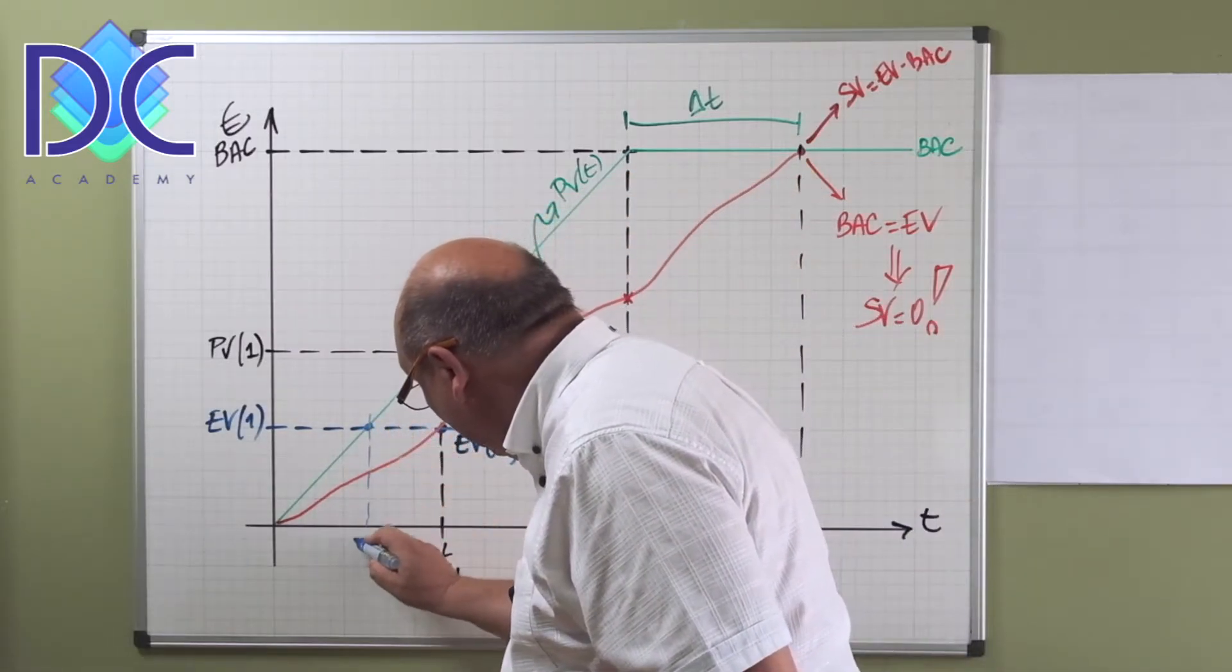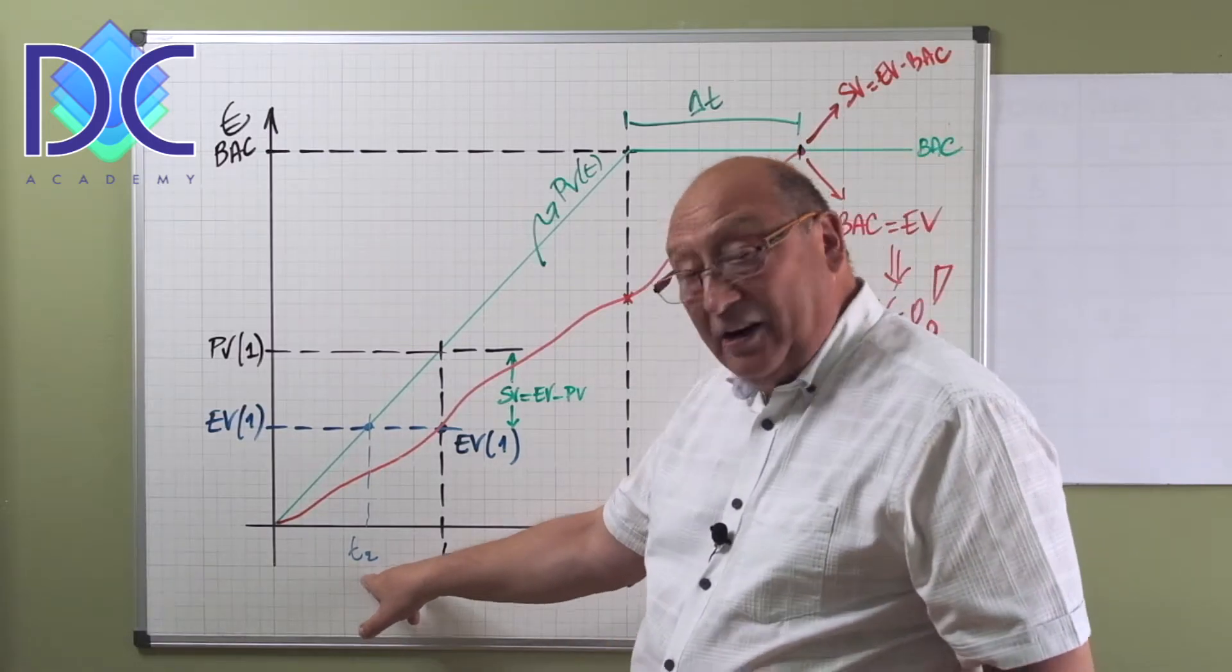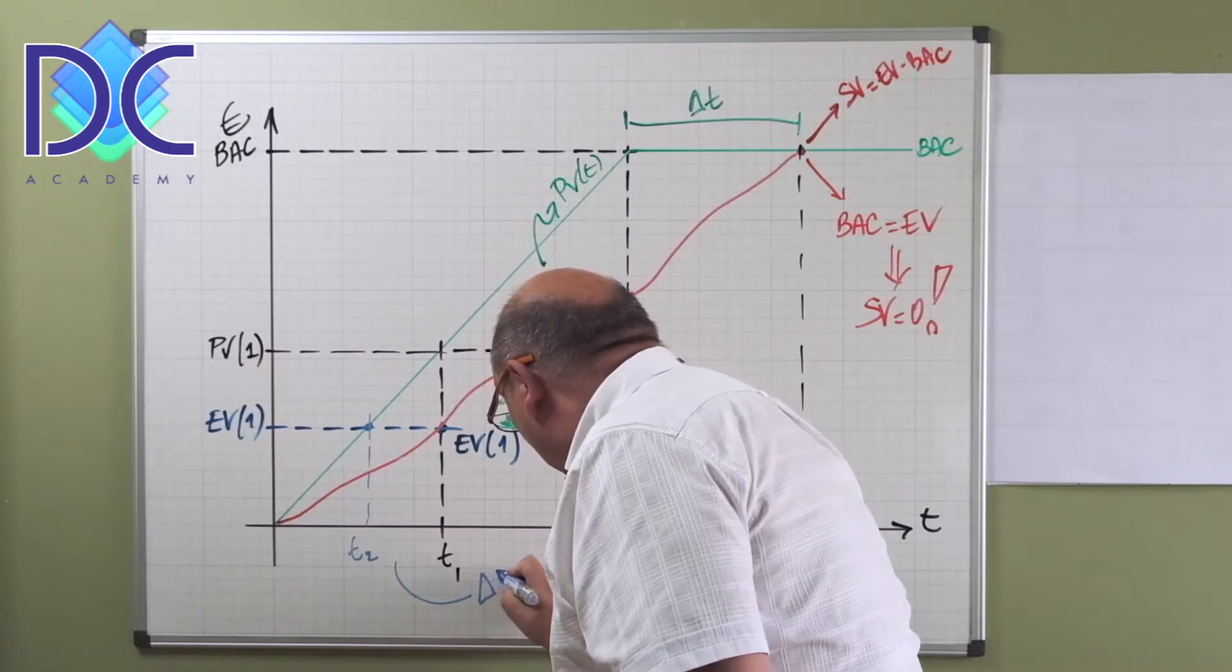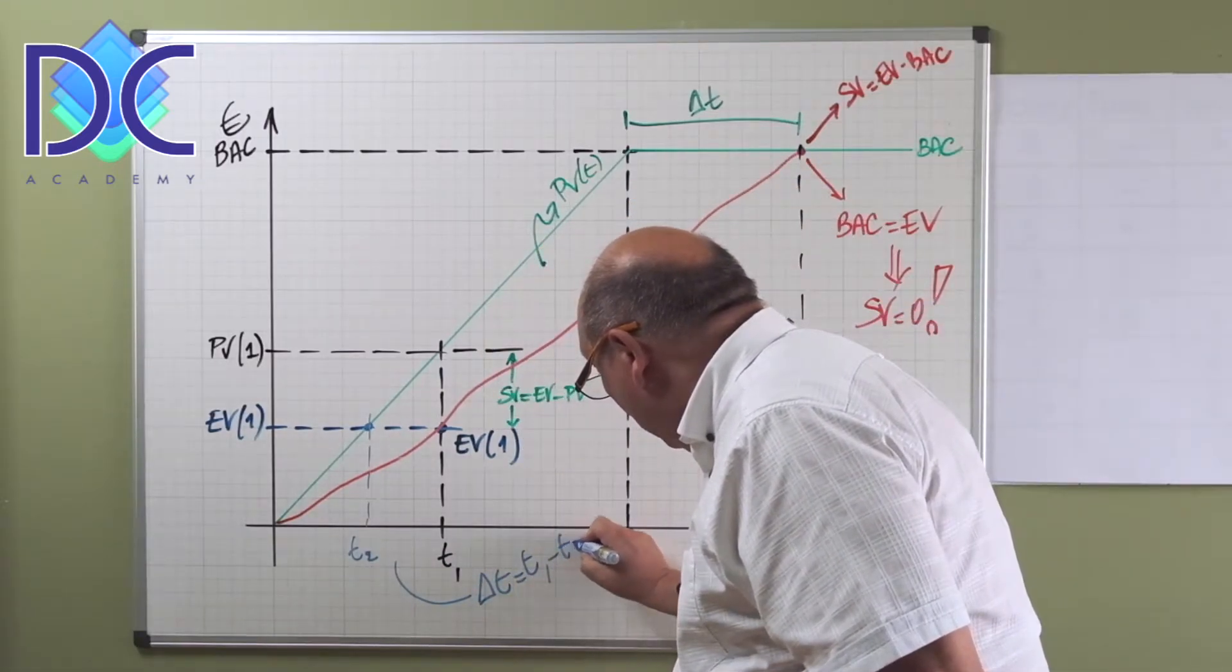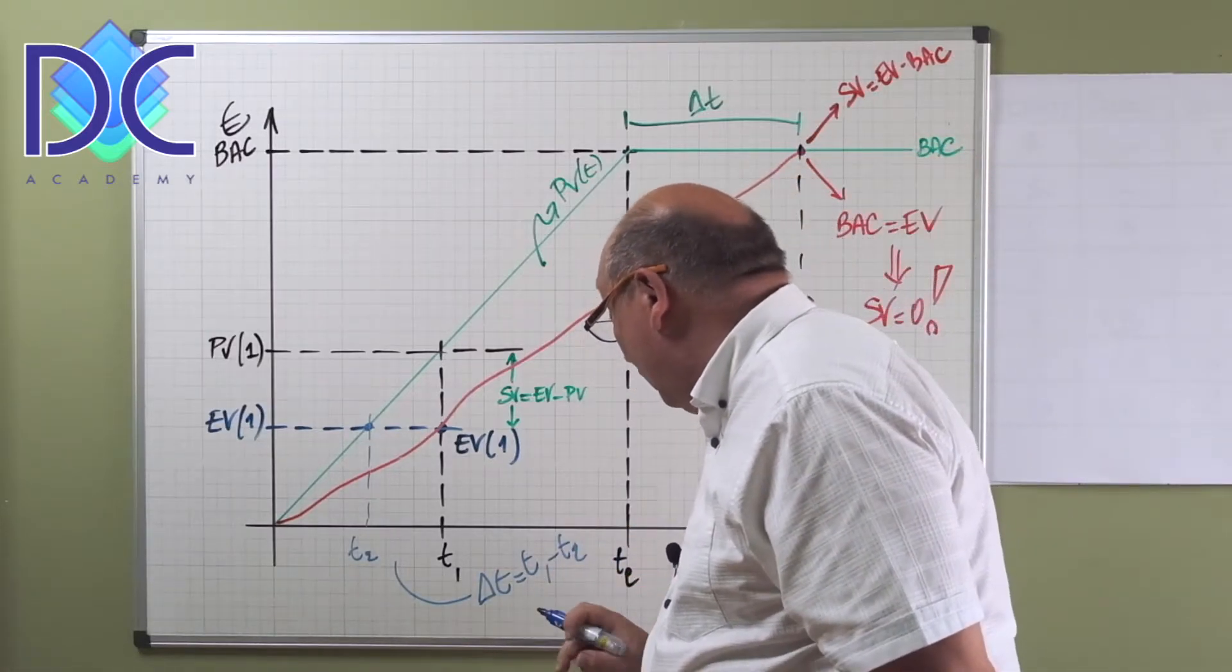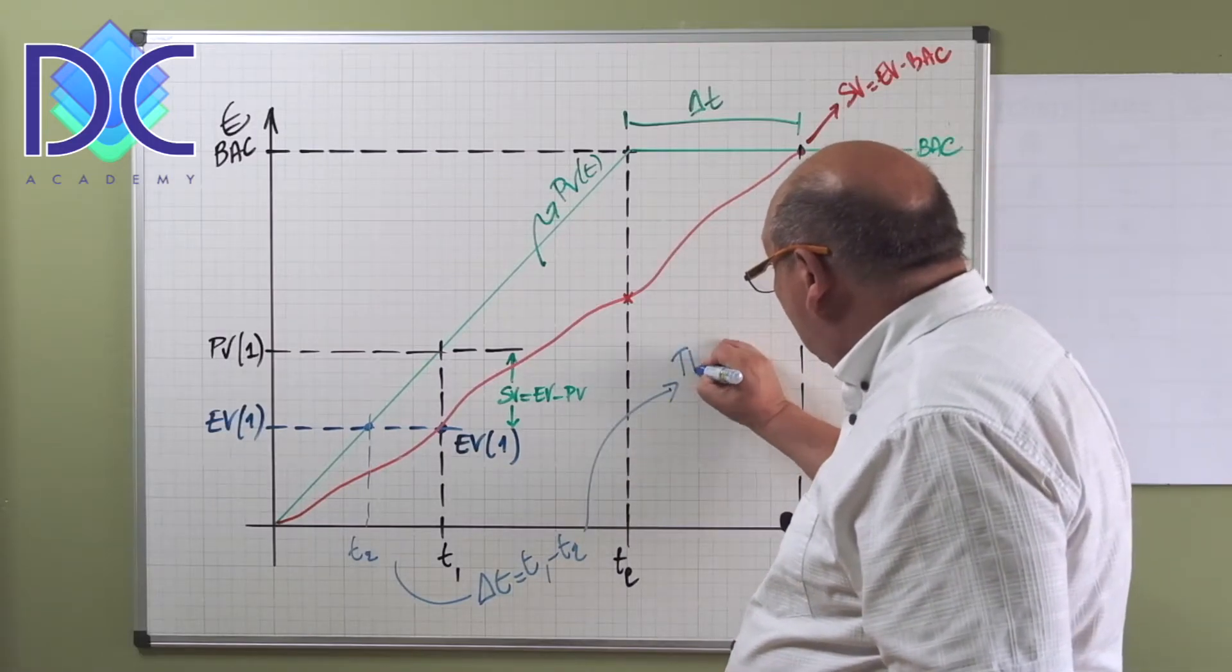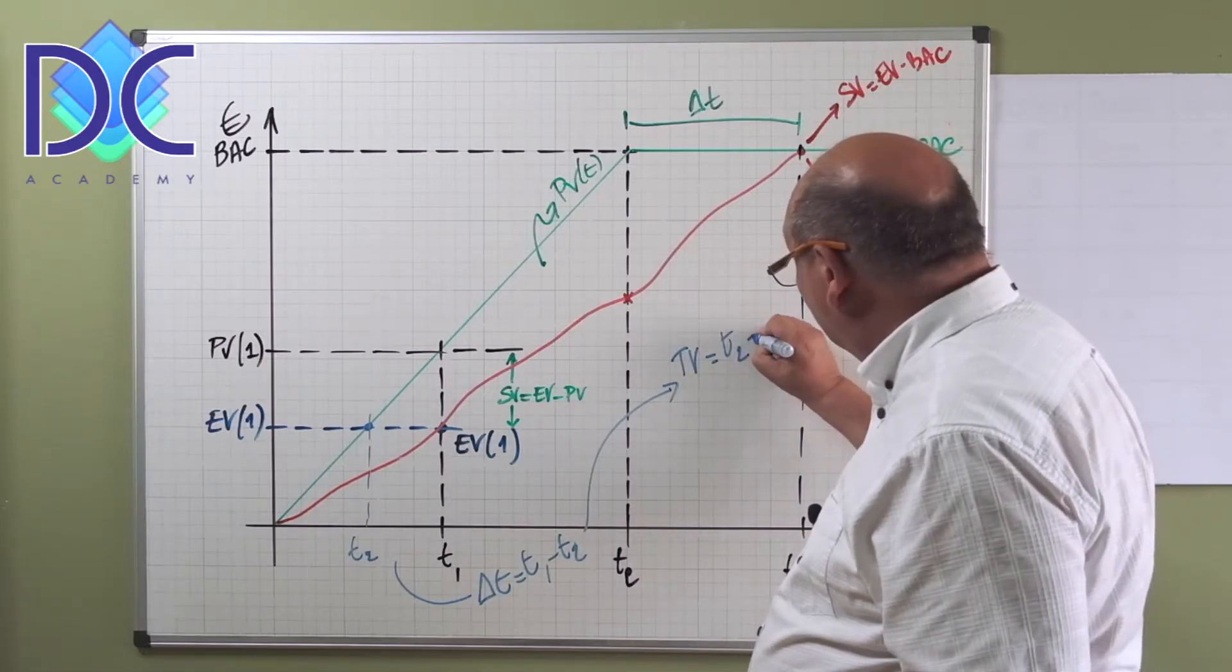Let's have a look. We earn the value at t1, but we should have earned the value here, which means let's call this t2. t2, which means we are late. We have a delta time here, delta time, which is t1 minus t2.